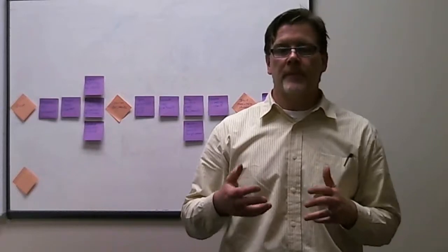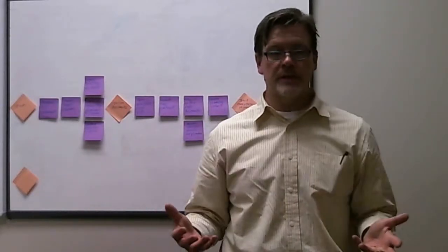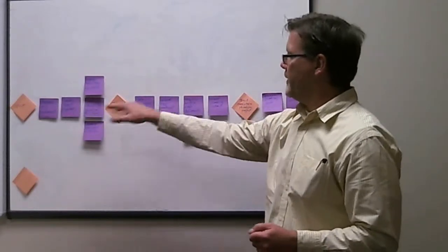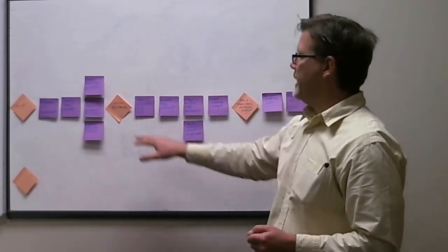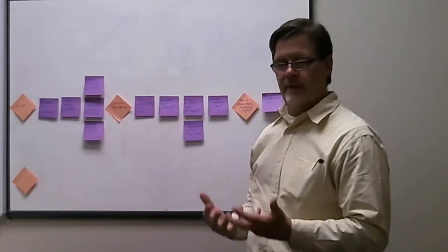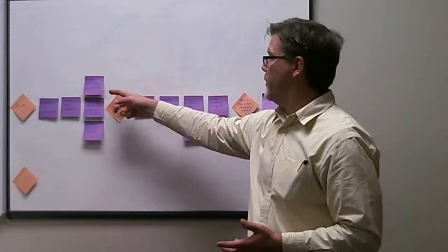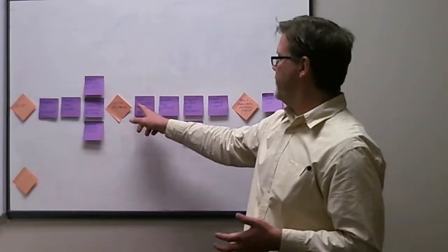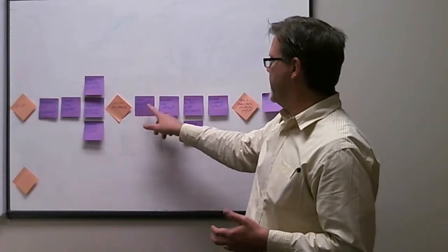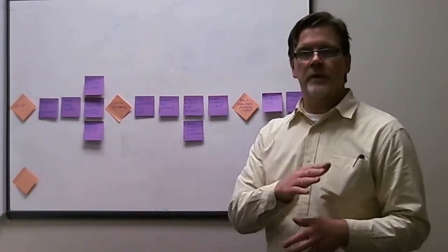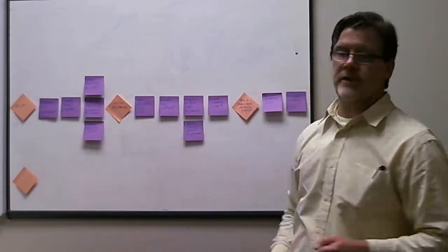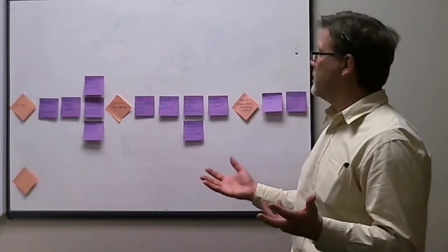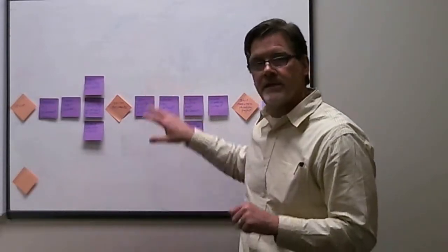And so as you reflect that, when you start to stake out your logic, you can see behind me with the example that going from left to right, you can see how I've translated and am sharing with you those activities which would be running in parallel. And obviously those activities that precede another activity are shown, as you can see, along in a straight line. So that's what you want to do with the sequencing. That simple.